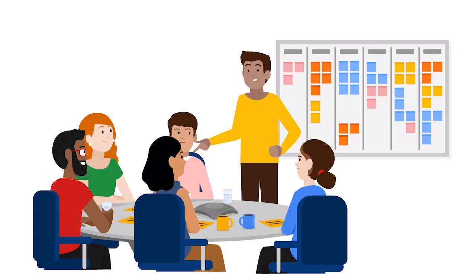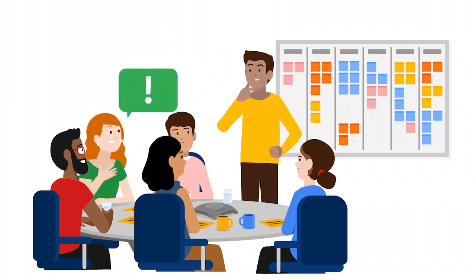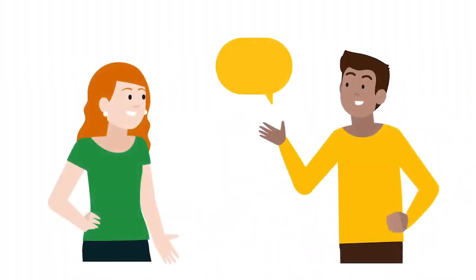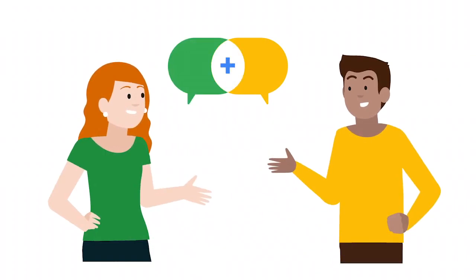Let's say your project is to develop a software product. During the retrospective for the last sprint, a team member says, "I need to implement a certain feature, but I don't have much experience building that particular feature." Someone else on the team is an expert on that feature, so you decide to pair them up so they can work on building the feature together during the next sprint. You've just blended XP and Scrum. XP provides the basis for working in pairs from pair programming, and retrospectives are a key component of Scrum.